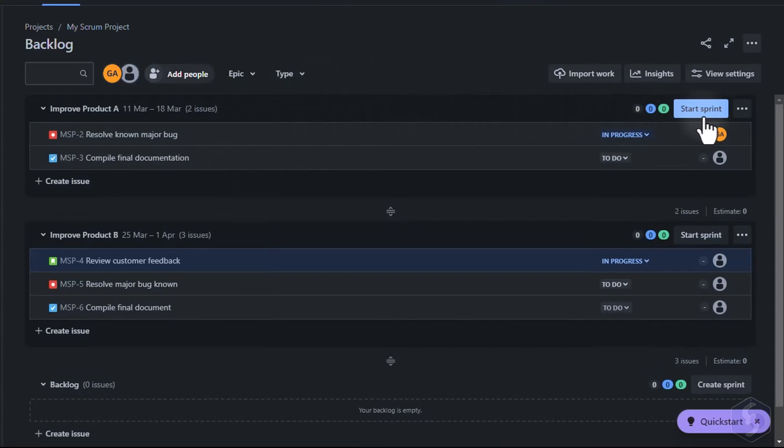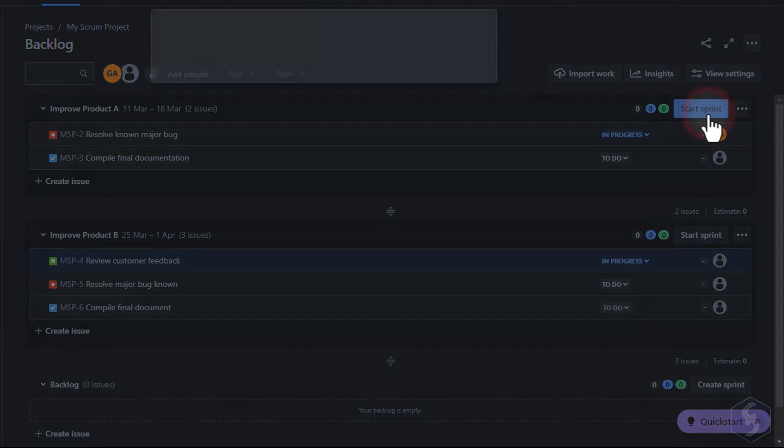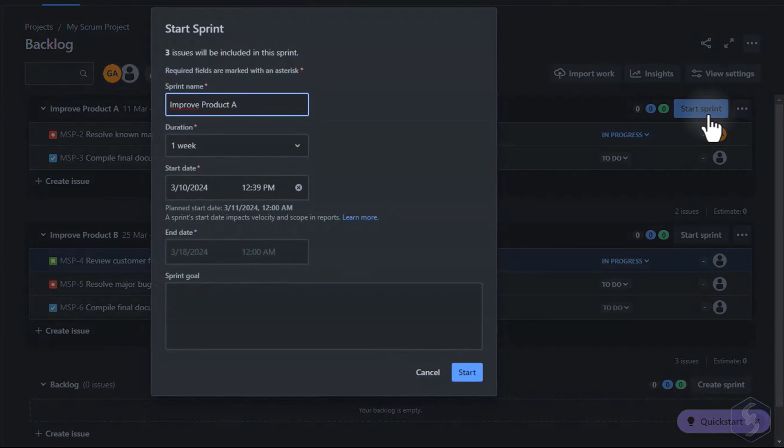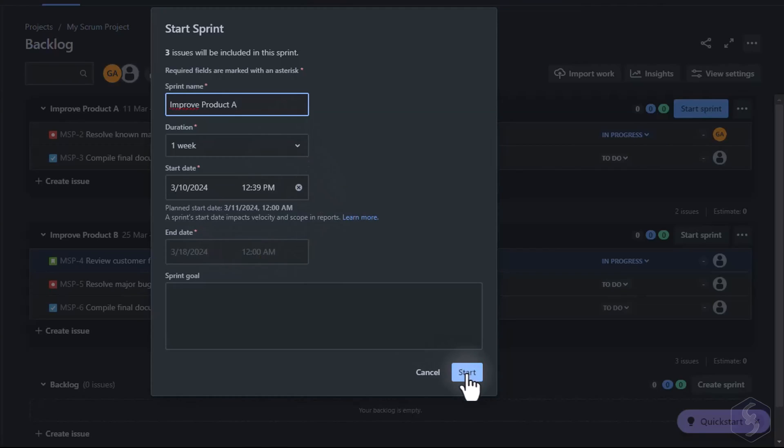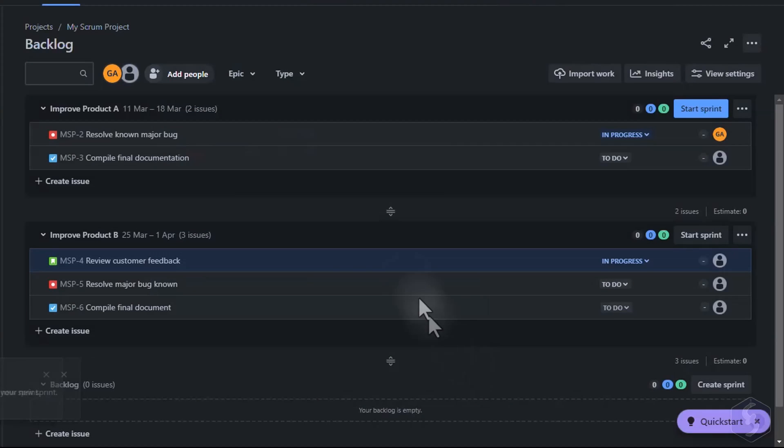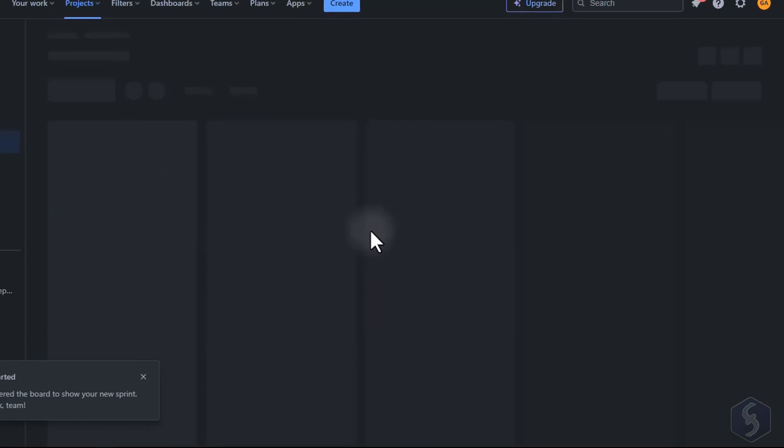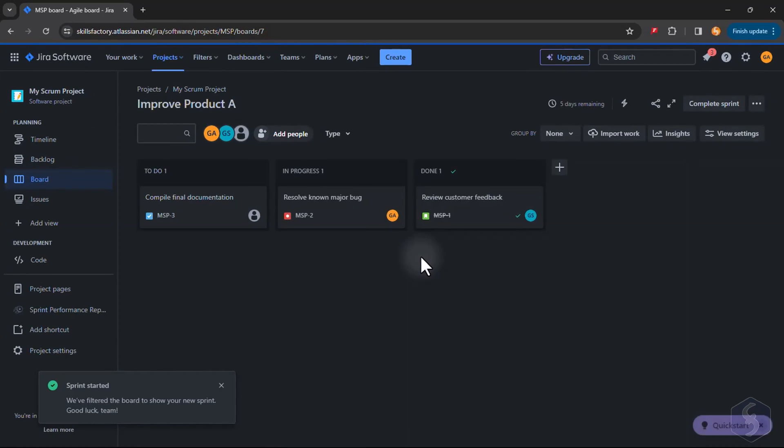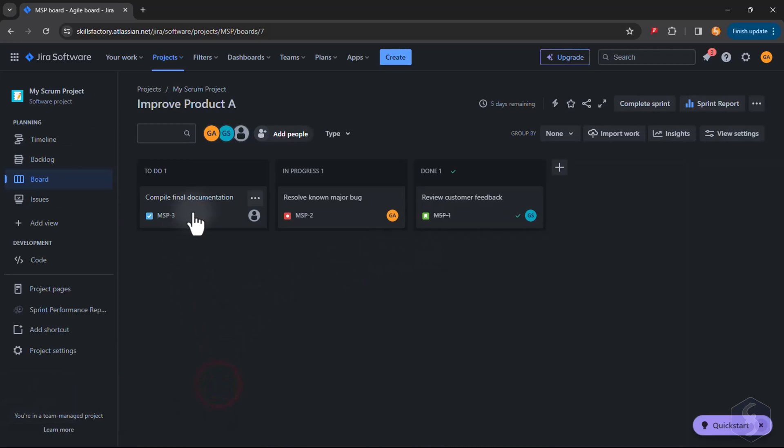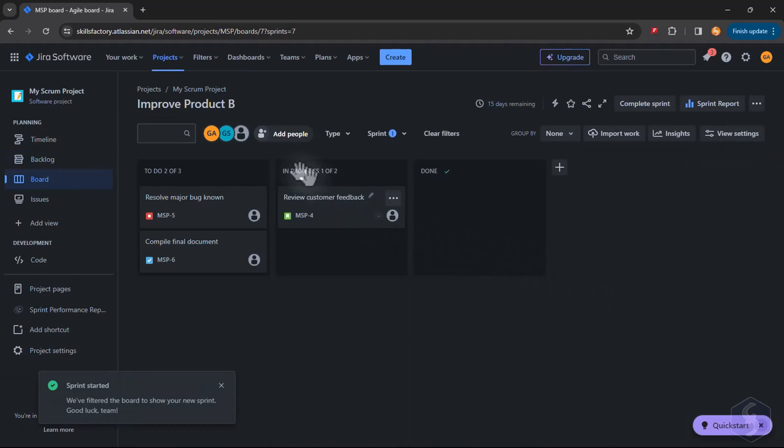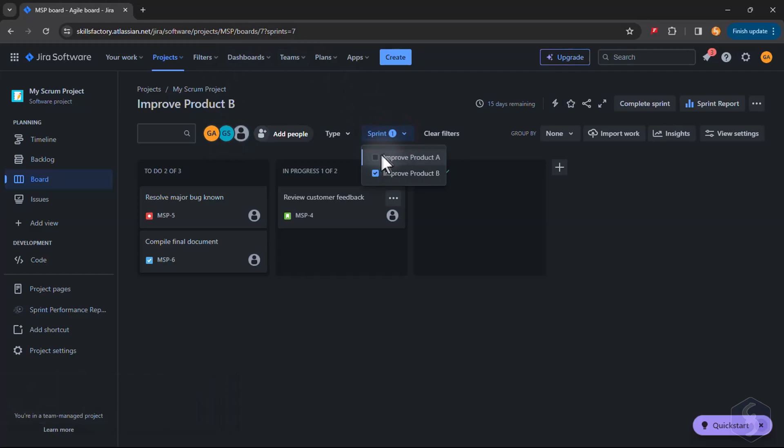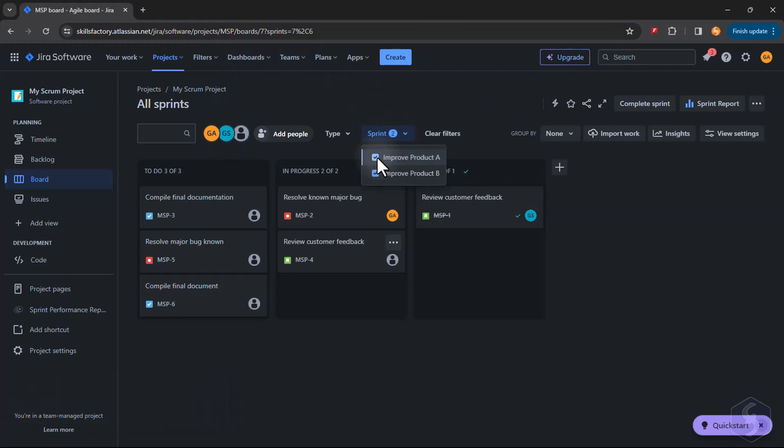When issues are set, go to Start Sprint to review its name, duration and then launch it. The Active Sprint opens in the Board section with all its issues shown. You can also switch between Active Sprints at the top.